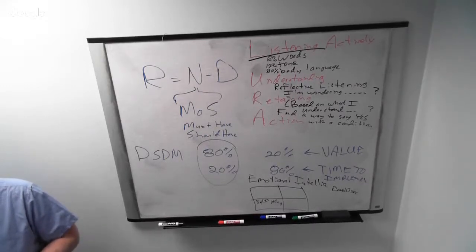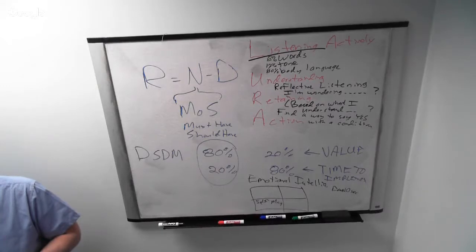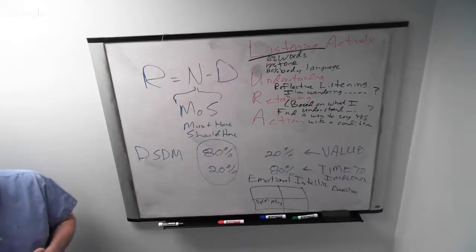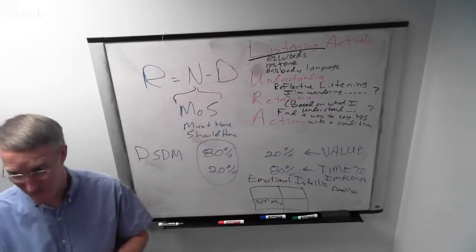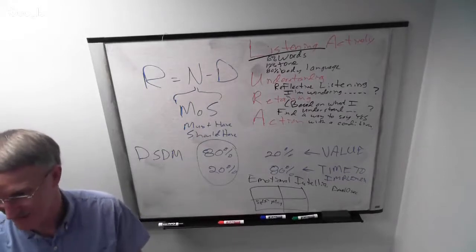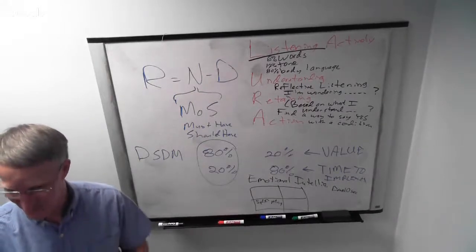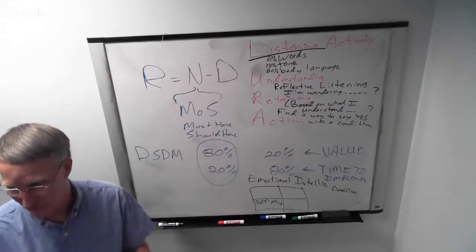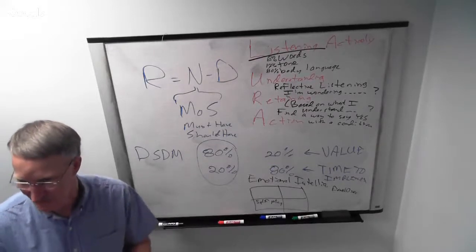The reason why I use "Do you agree?" is because I'm working with the stakeholders. And if I can get a lot of agreements, at the end, you can sign off on this. Yes, that's a perfect time to use it. When you need to hit that point of sign off, that question has to be on the table. Do you agree with this and this? That's the whole point of doing a requirements review.